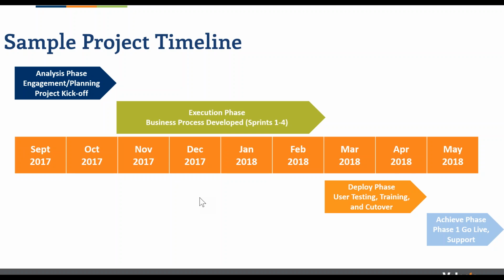But really, what I wanted to give you here is what I would call a typical implementation. Now, this is risky to present because, to be honest, the shortest implementation I worked on was 3 months. The longest one that I worked on is 3 years. So I'm going to use typical in gigantic air quotes because it really does depend.